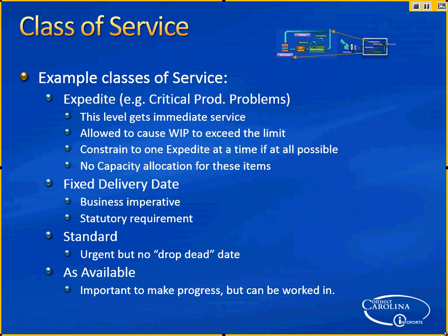So let's talk about that. For a fixed delivery date, the presumption here is we know about this. When we're doing release planning, you ought to be thinking about the priority of this needing to be high enough, ideally, so that it's ready to go live the release before it's needed. That's what you'd be trying to do, right? Obviously, you might not always be able to do that, in which case, yes, you're going to violate the release date because the next standard release date is too late. But you should be planning so that you release it on a standard cadence at a time that meets the requirement.